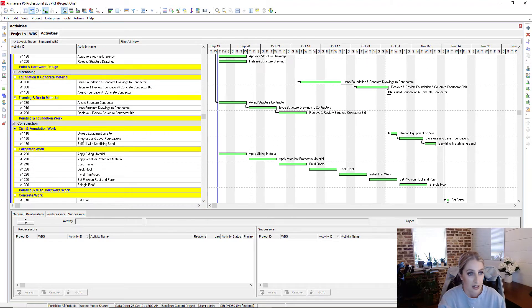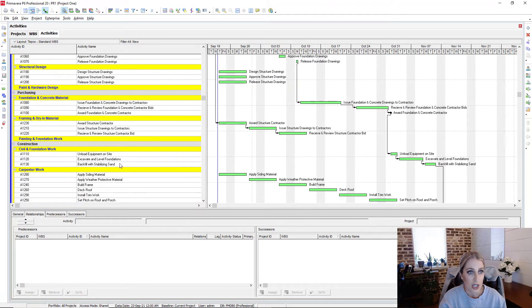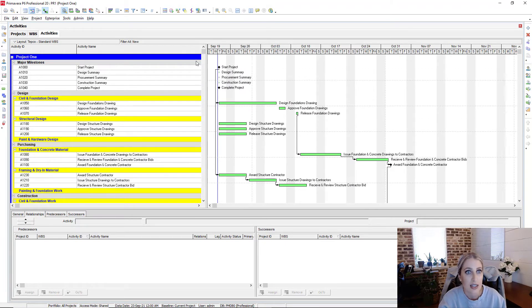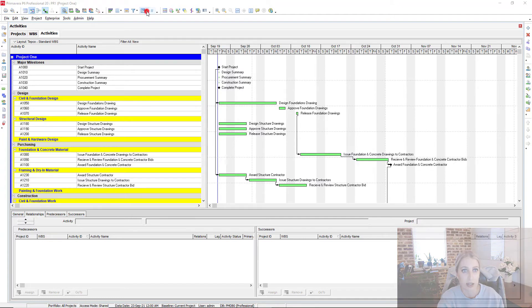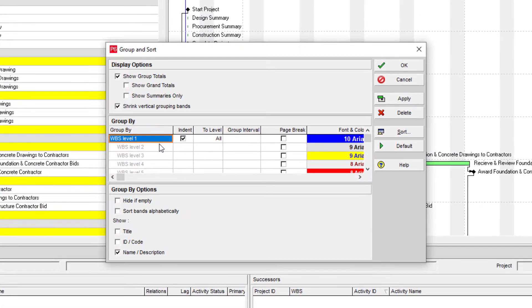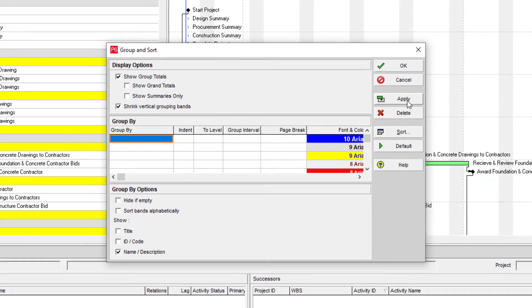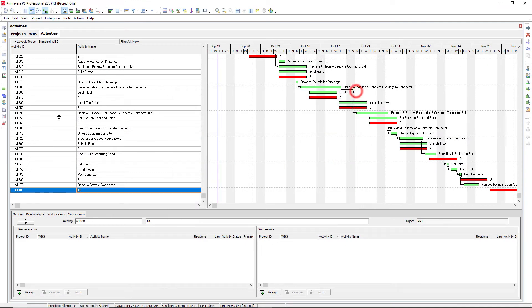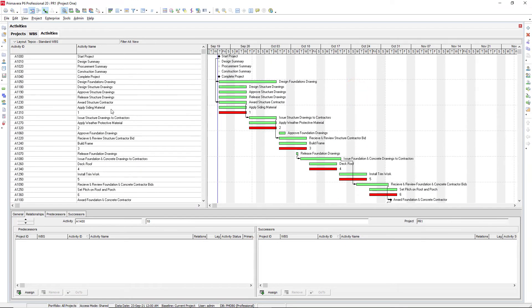Another way that we could remove logic for the entire project is the easiest way to probably look at it is by going into our group and sort, and then getting rid of any of our levels that we have and just having everything as just a single list.